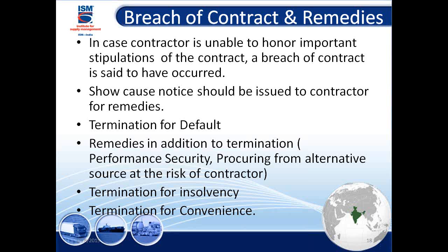Suppose this guy is not able to do it, you went on giving liquidated damages, it has gone to 10%, and you terminate the contract. Then you go to another vendor, and certainly the second one has a higher price, 10% more. That difference in price you will claim from the first one. You will say, because of you, I have to go to the second vendor whose price is 10% more, so that difference has to come from you guys. So these are other methods also available.